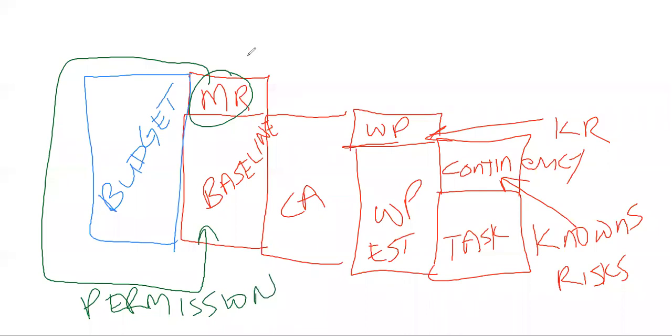If there is no permission, you cannot move it. But when there is permission, you can move some of that. So let's say you moved 2 million. That 2 million you moved gets put into the cost baseline. So the management reserve depletes by 2 million, but the baseline increases by 2 million. And that 2 million is used from that point go forward for earned value computations.